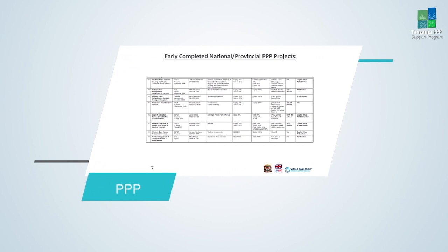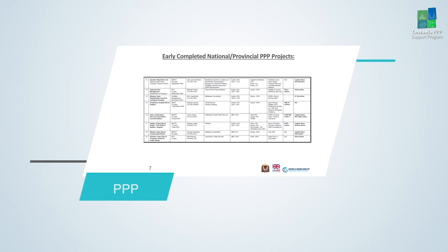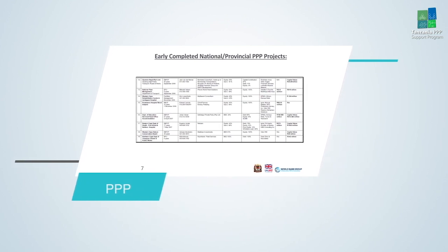An accommodation PPP would refer to a PPP where the private partner is providing the building and maintaining it and the equipment. They're not actually occupying the building or delivering the service, but they're providing the infrastructure. So you see accommodation PPPs used for schools, like John mentioned. In those cases, the students come from the public education system, as do the teachers, the curriculum, and the administrators.